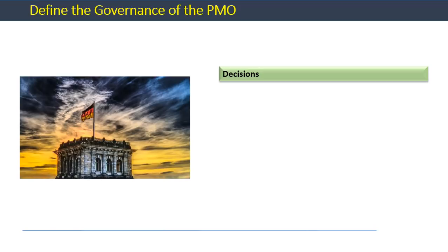The second dimension related to governance is about the processes. The decisions that are needed as part of the PMO governance include approvals for project charters, project deliverables, moving from one stage gate to the next, etc. Although this dimension may seem like the earlier one, where processes were identified and elaborated on, it's different. For example, there may be multiple decision points related to the process of selecting and starting projects, and those decisions will be highlighted for each of the PMO processes.